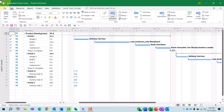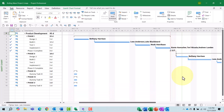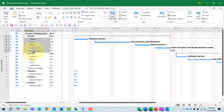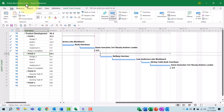Let's fast forward now into the future. Please notice that the current date is Wednesday, February 12th, indicated by the thin green grid line in the Gantt chart screen. Notice that the status date was set as Friday, February 7th, as indicated by this red dashed line in the Gantt chart screen. Also, please notice that all of the tasks in Phase 1 have been completed, and all of the tasks in Phase 2 are now completely planned, including having resources assigned to them.